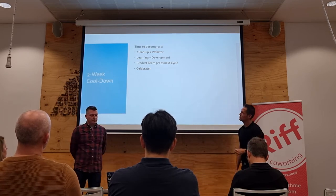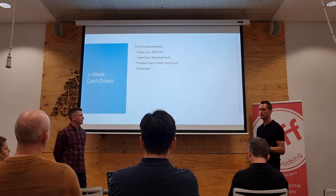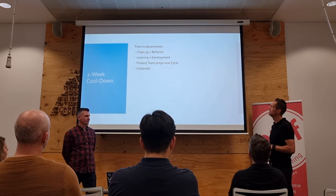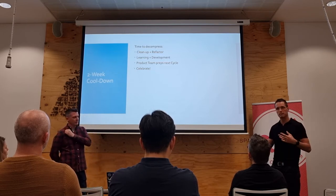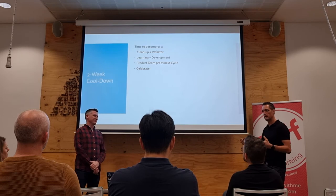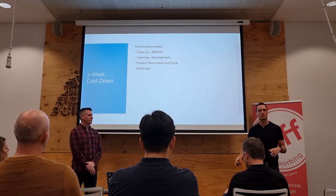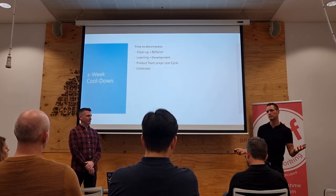So also, it's not just 6 weeks. We have a 2 week cool down. I'm sure there'll be questions about this at the end. 2 weeks where we're just not working on project work. It's time to clean up and refactor, learning and development, which is a big part of our culture. We talked about team growth. The product team then get really busy for 2 weeks and prepare the next cycle. And we also get a chance all to celebrate together because there isn't half the team working on something critical and the other half of the team slumping off.